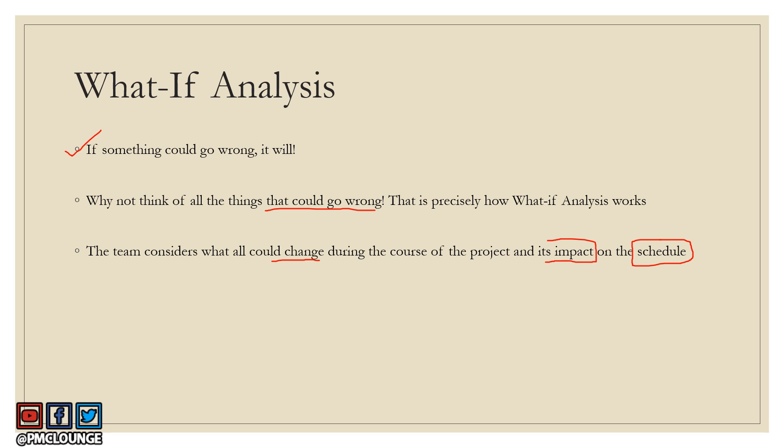What-if analysis touches the risk management area, because you're sitting with the project team considering what could go wrong. However, this is part of schedule management, not risk management, because you're specifically looking at scenarios that impact the schedule — not cost or other areas. This helps reduce the unknowns by considering everything that could change during the course of the project.